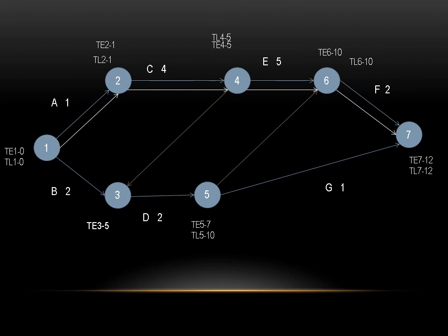In reverse, I have told you to write the least. 5 is 10, then 3 is 8. How is it 8? 5 to 3, if we reverse it, 5 to 3, 10 minus 2, it is 8. And it is the only way in which 3 is completed.